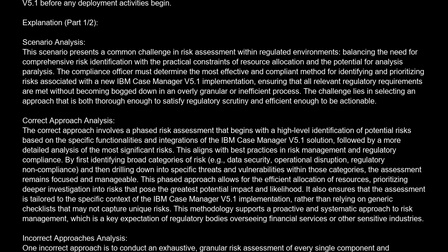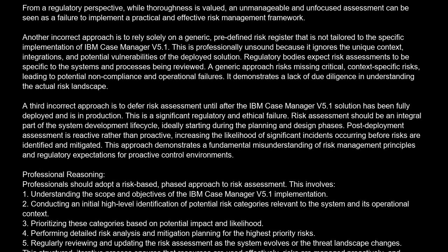Incorrect approaches analysis. One incorrect approach is to conduct an exhaustive, granular risk assessment of every single component and configuration option within IBM Case Manager v5.1 from the outset. This is professionally unacceptable because it is highly inefficient, time-consuming, and prone to analysis paralysis. It fails to prioritize effectively and may lead to the identification of numerous minor risks while overlooking more significant ones due to the sheer volume of detail. From a regulatory perspective, while thoroughness is valued, an unmanageable and unfocused assessment can be seen as a failure to implement a practical and effective risk management framework.